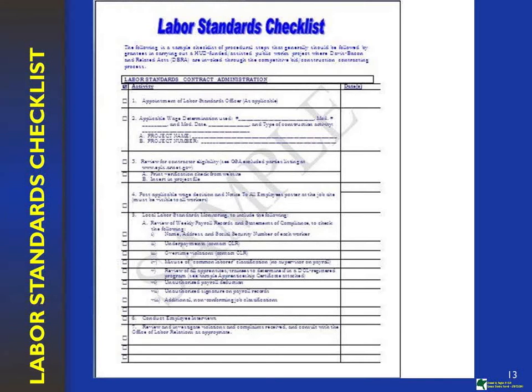And you should print that page out that you get saying no activity. When it says no activity, that basically says that they're eligible. It's kind of a misnomer. But I would suggest printing that and perhaps stapling it to a checklist, or certainly at a minimum putting it into your contract file.